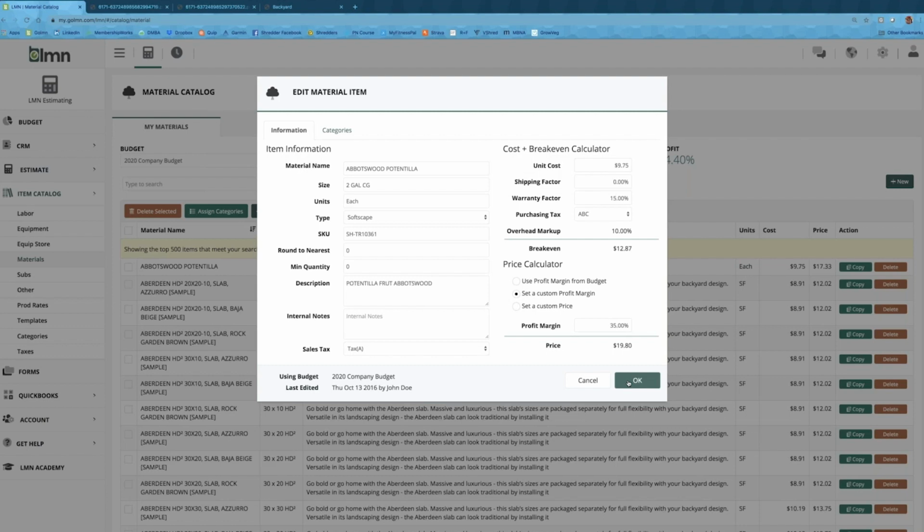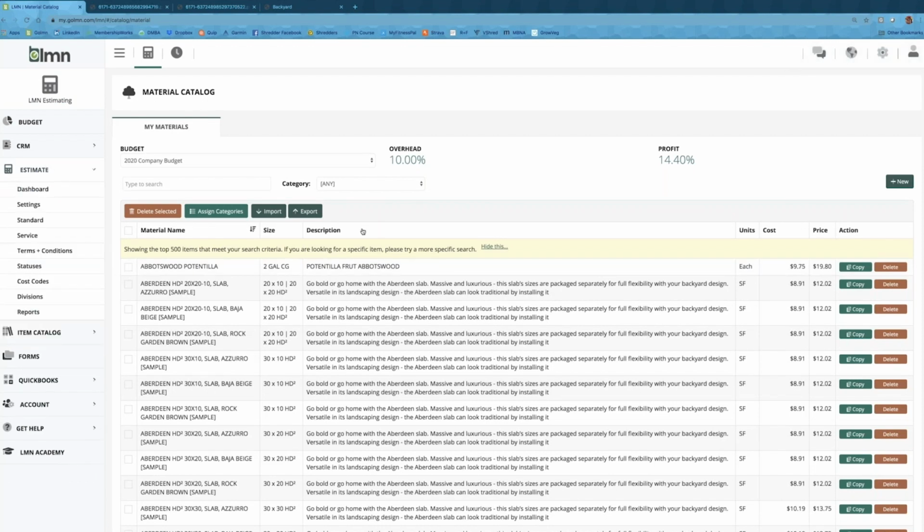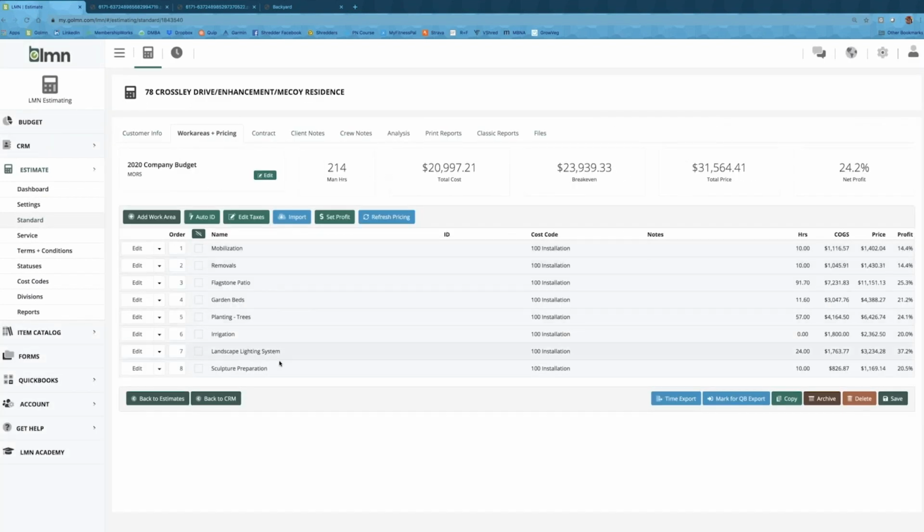What I haven't done, but I've seen a lot of companies do, is create within the estimate a warranty template and actually charge for warranty as a service. They create a work area called warranty and apply that as a line item to the quote. I think that's a good idea. Customers may push back a little bit on it, but if it's explained properly in the sales process, it's not a bad way to do it.